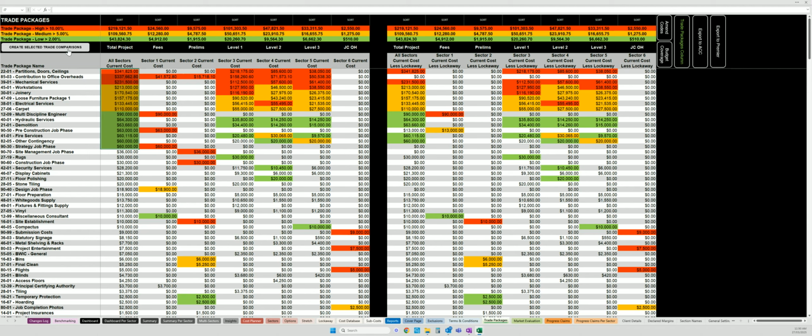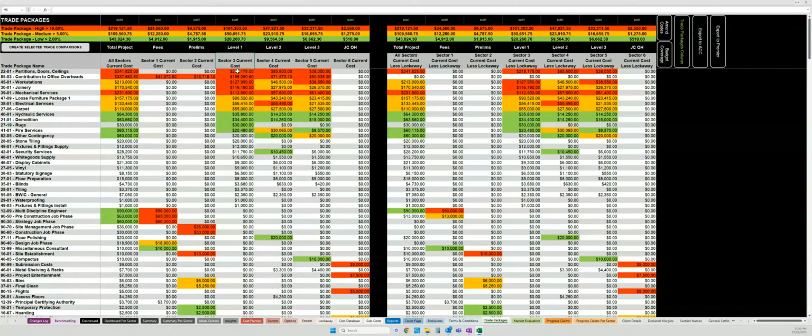And so I'm now going to show you the export, the template that it auto-populates for the evaluation to take place. We can evaluate on the total project, or we may be evaluating on a portion of the works. Your sectors may be broken up into separable portions. We're only evaluating separable portion 1. I may evaluate then on sector 3, which is separable portion 1.